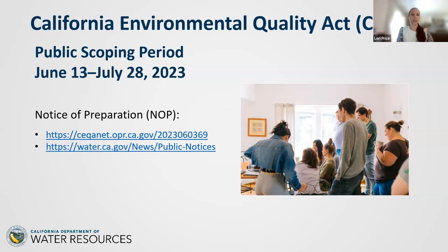DWR is the CEQA lead agency for the Little Egbert Multi-Benefit Project. As CEQA lead, DWR must consider opportunities to avoid or mitigate the impacts of a project and identify project alternatives. We are also obligated to facilitate public review, consult with Native American tribes, and notify the responsible and trustee agencies that may have permit or approval authorities or interests in the project.